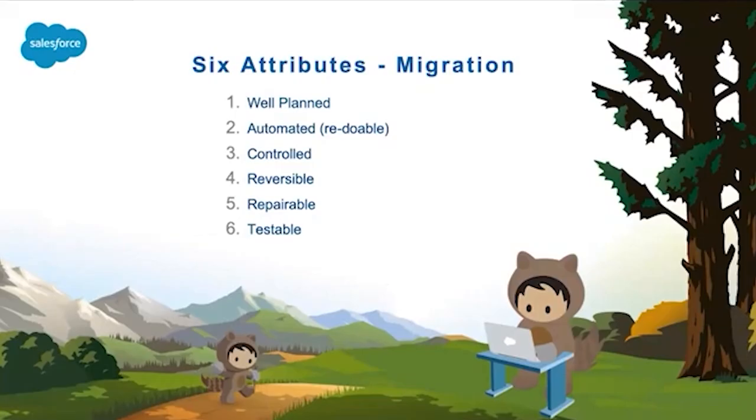The main key of automation is to avoid human error, and even your simple migration plan involves 3 minimal scheduled runs: one for dev, one for QA/UAT, and one for production. That's where automation plays a vital role in avoiding human error and saving time. The common tools you will be using are middleware-specific tools, or even Data Loader, Informatica, or the Data Import Wizard. Any of them can be used for this automation.